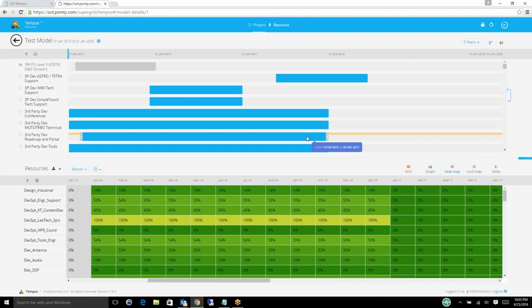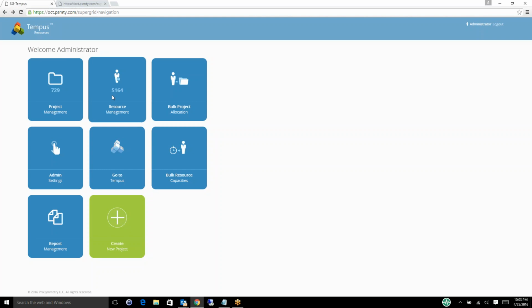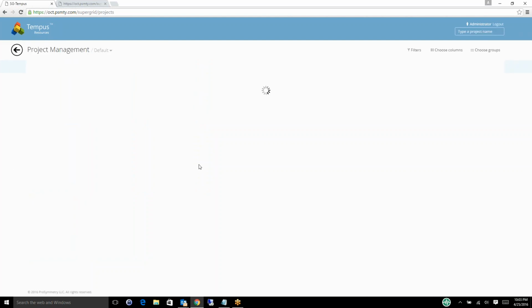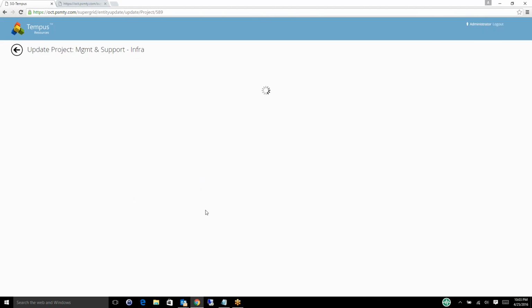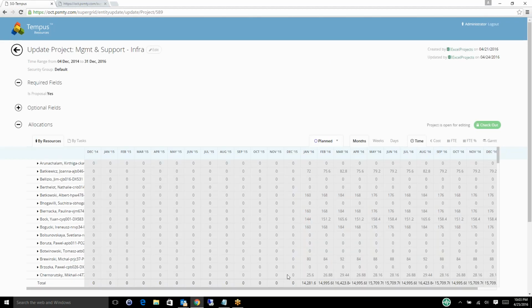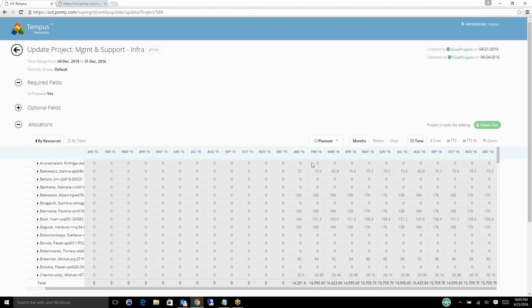So when I drag on the add 10%, 20%, like what you just simulated earlier, how does that translate to the extension? Yep, so if we're extending, we're taking how the data are currently allocated and smoothing it out. So for example, if we go back to one of these projects, and let's look at this one here. Hopefully this one has some detail. Yep, in this case, this one has a huge volume of assigned resources. Let's say we double the length of the project. It's going to, in effect, smooth each one of these out by doubling its time frame. So we may smooth out 72 to 36 per month.